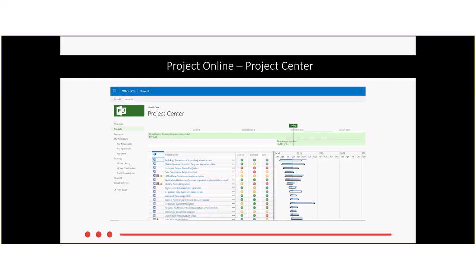And you can make those subjective or calculated. Generally what I like to recommend is that the overall indicator is the subjective assessment by the project managers. And then you set up a calculated field for cost and schedule to give you the insight that all projects are being measured from the same point of view. And over here on the side, I can see my baseline and my current plan on top. So I can get a real quick view of all those projects just by changing where that information is stored. Instead of an MPP file, we're saving it into the cloud, into Project Online.